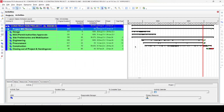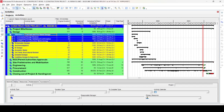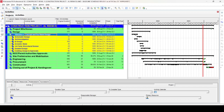Once the bars are shown, you can see there are too many intermediate milestones displayed. If you open the dialog box for a particular WBS, you can see other milestones. For example, one entry combines three WBS names — 'validation', 'concept', and 'fire rated design' — and summarizes them, showing all finish milestones or start milestones under that WBS. That's why you see several milestone icons.